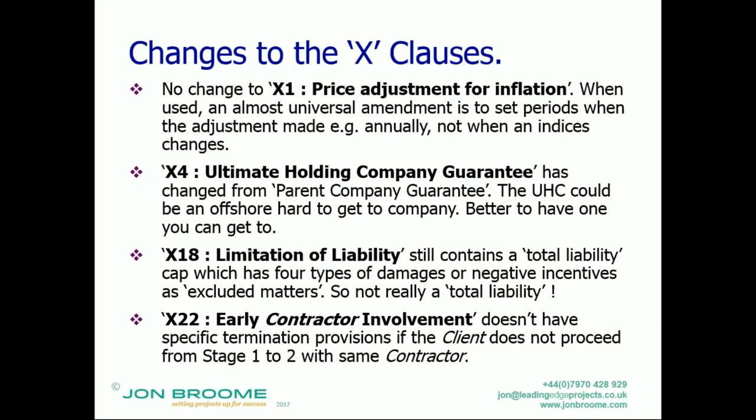Well, actually, if the definition of the works is I want you to work with us to design and develop it and then construct this asset, and I haven't actually terminated that contract, then the contractor who had it originally could say, actually, legally, you're not allowed to give it to that other one until you terminate. And that would mean that actually it would be terminating it for any other reason.